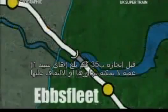35 kilometers from completion, High Speed 1 reaches an obstacle it can't bridge or bypass. The Thames Tunnel represented the largest single risk on the whole of the project. The risks: cave-in, flooding, and failure. The Thames Tunnel is actually two tunnels side by side, each 7 meters across and more than 2 kilometers long. And so deep, you could stand a 10-story building underwater.